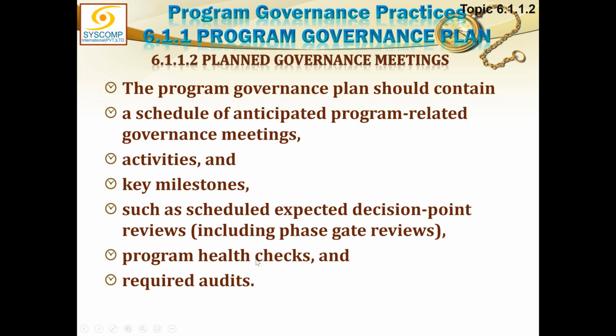Then we have the program health checks, as I mentioned. A program health check is the X-ray of the frozen state of a program at any point in the life of the program. It could be taken anytime. It could be a surprise check, or it could be a scheduled check.